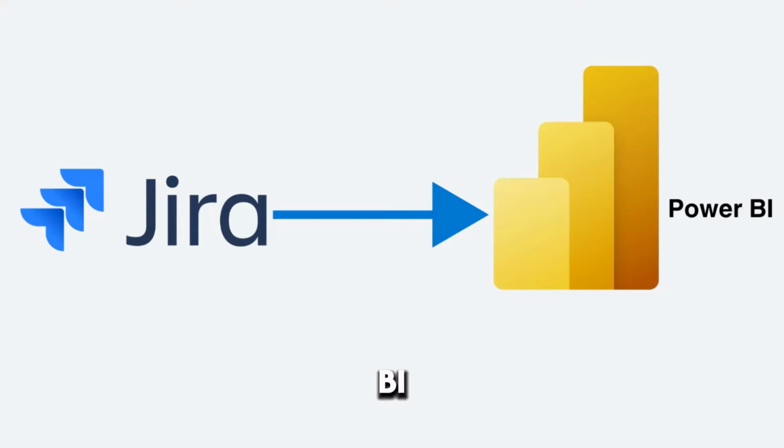Connecting Jira to Power BI enables seamless data visualization for project metrics like issues, sprints, and workflows. The easiest no-code method uses the Power BI connector for Jira app from the Atlassian Marketplace, free for 10 users, around $10 per month otherwise.